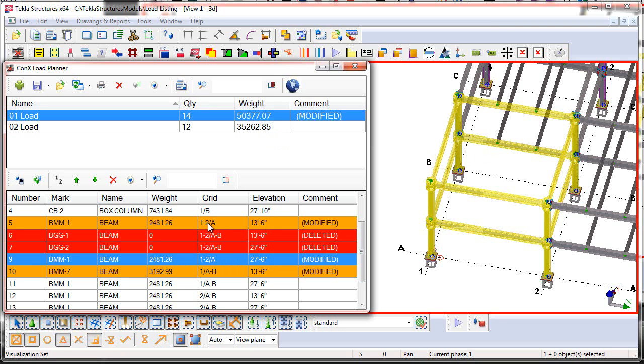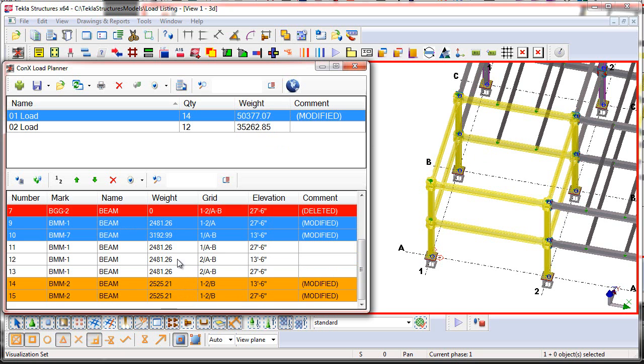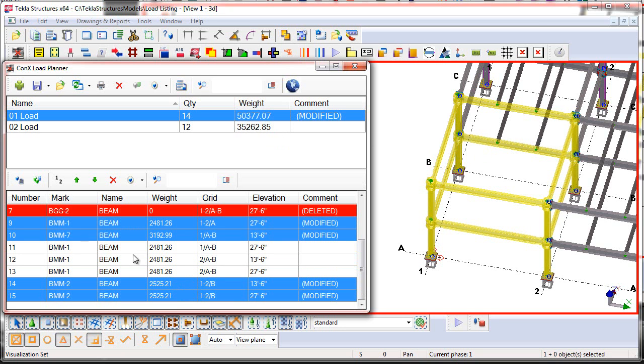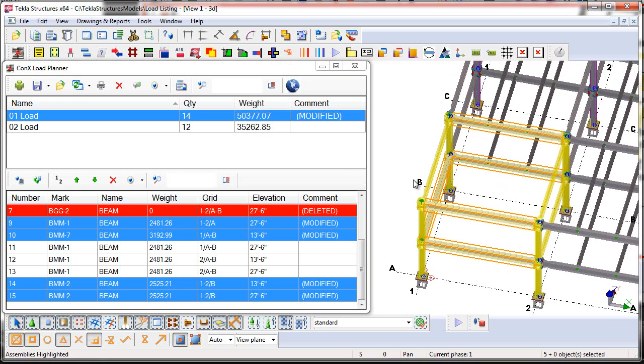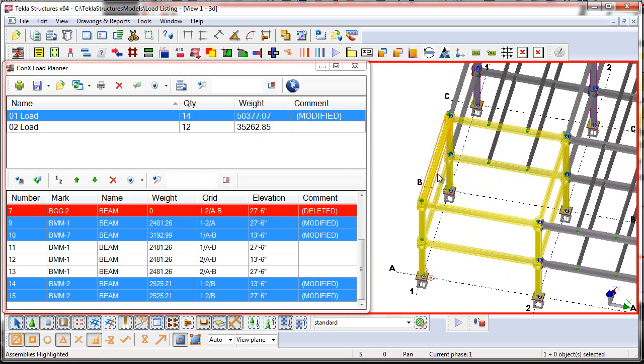Now, what we can also do is we can hold down the Control key and select these modified items, and then what we can do is we can go ahead and say, let's highlight those in the model. So we'll press the Highlight Assemblies. So this shows us the assemblies that were modified. Now I can see that because we deleted the beams, the connections changed, the weight, and thus the piece marks may have changed here on these assemblies, but something has changed here on this particular assembly.